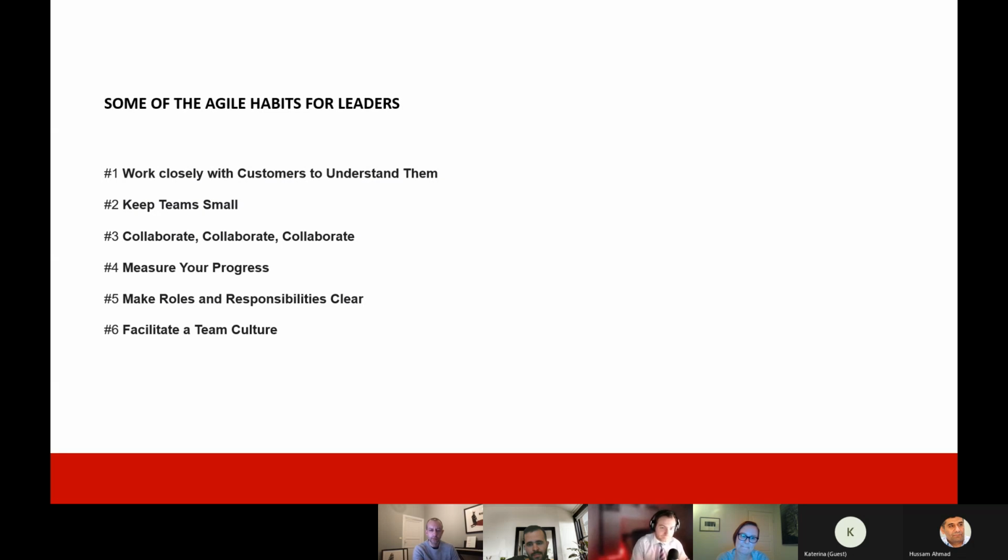The stakeholders. One thing we have is some client interaction every week, with 2-3 clients, picking up things that they might mention about the product or ideas that they have, and writing a list. Then we groom that list now and then, put some kind of score into it, and make it into the product backlog.